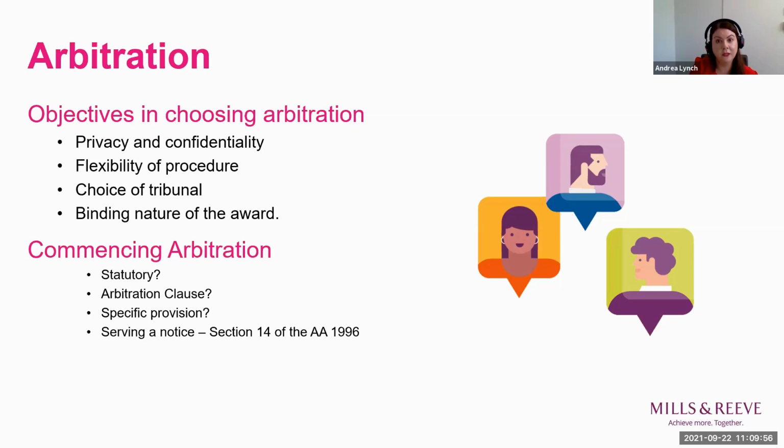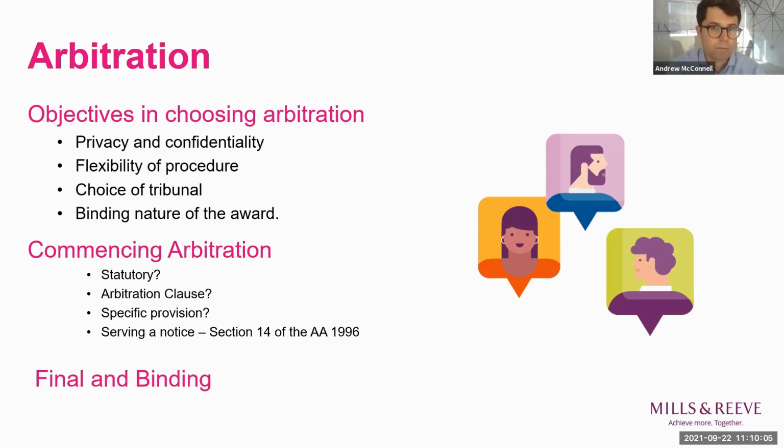Thanks, Andrew. Out of interest, why do you think it's one of the less commonly utilised forms of dispute resolution in a construction setting? Well, there are probably several reasons, Andrea, but I think it's primarily because arbitration is final and binding, as I've mentioned several times now, which leaves very little room for negotiation between the parties. It can prove costly in terms of costs for lawyers and the arbitrator themselves. And there are other forms of ADR available, which are potentially more cost effective and quicker forms of resolution. And we'll obviously come on to those later today.